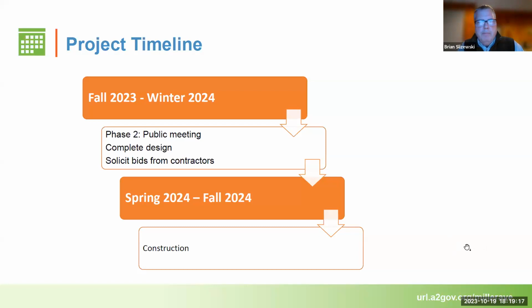The utility work, the water main work, takes a fair amount of time. It's a fairly disruptive process to the corridor. So we need to get that work started as soon as we can, so that we can move into the other stormwater improvements and then get the paving completed by, I would say, this time of the year next year, so the road will be 100% complete during the construction year in 2024.